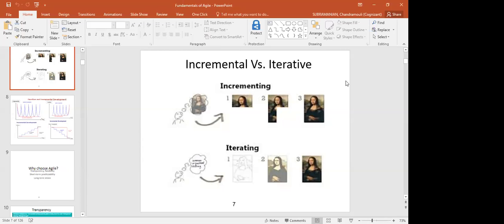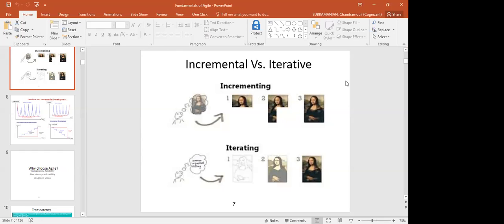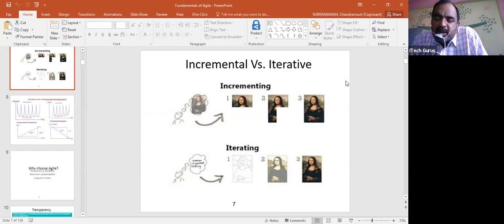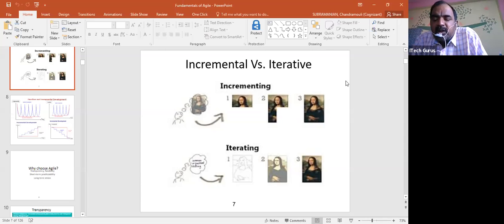On the 20%, right? On the 20% functionality, right? Okay. Now, after doing 20, which one will you do? 35, correct? What will you do on 45? Try not developing it. You got what I'm saying? That will save a lot of time for everybody. Are you able to understand? Or maybe try to do it at the last if you have time.